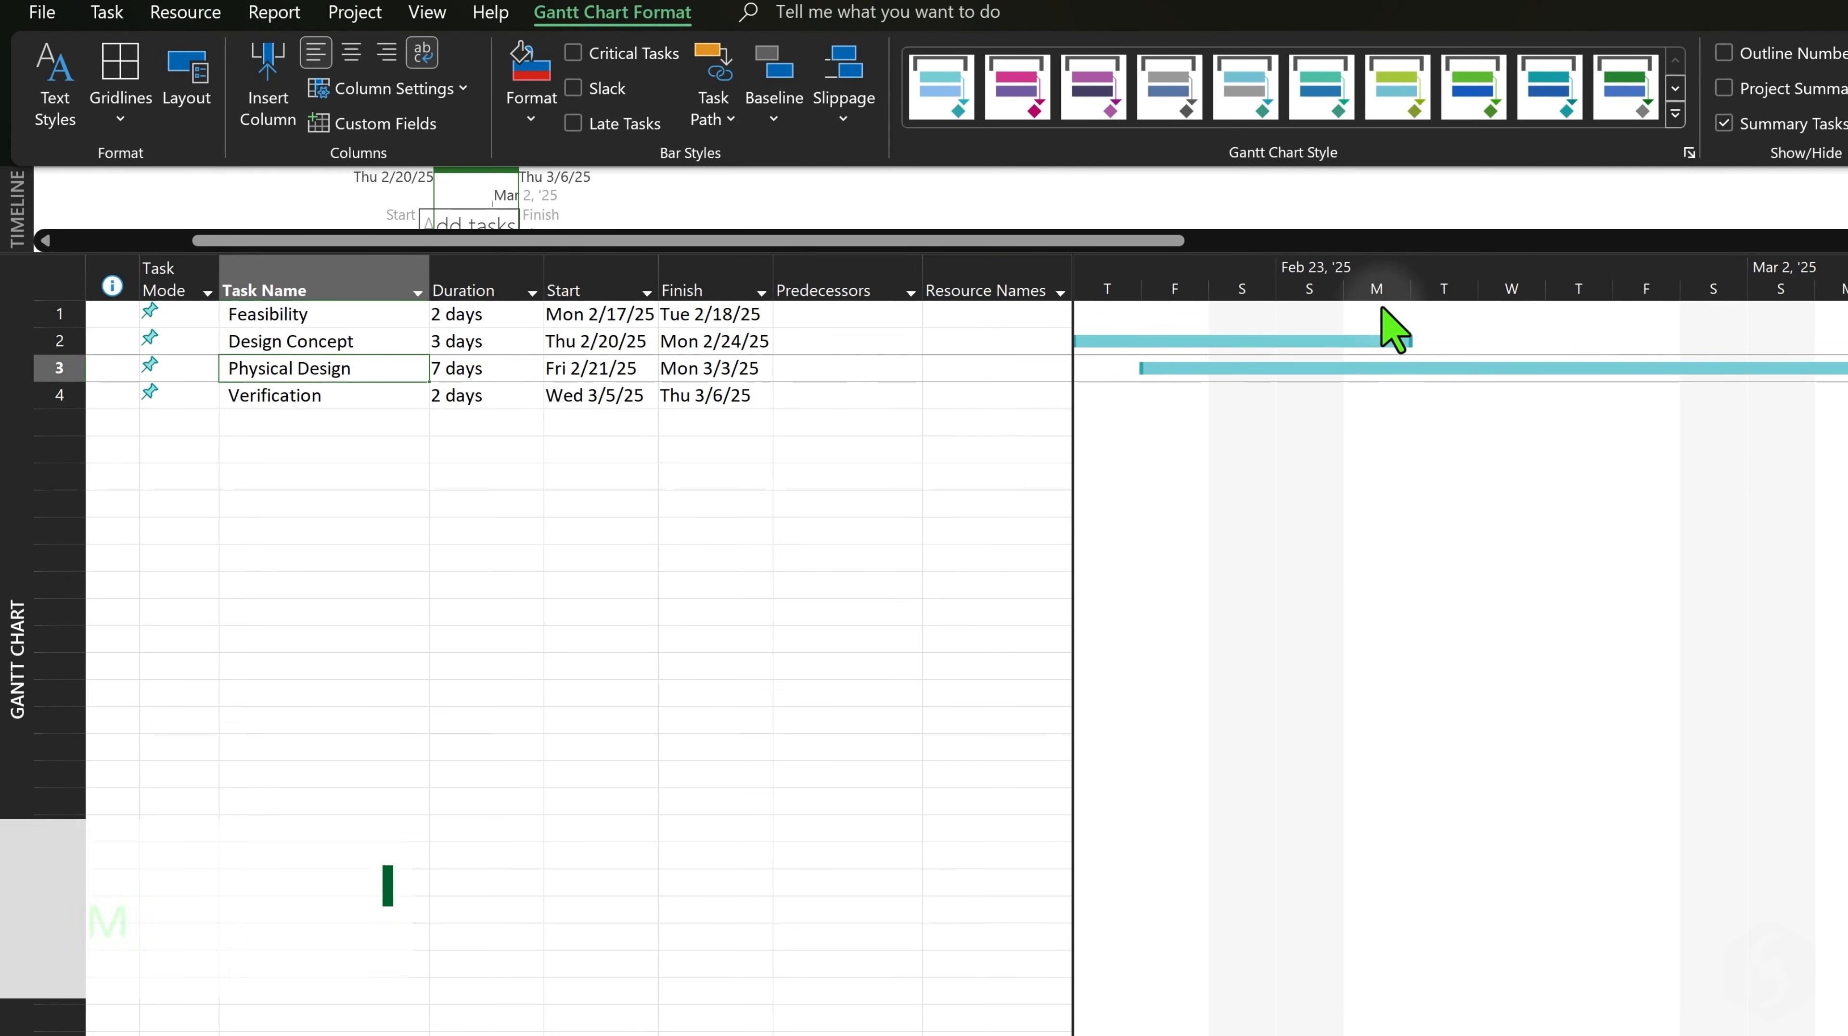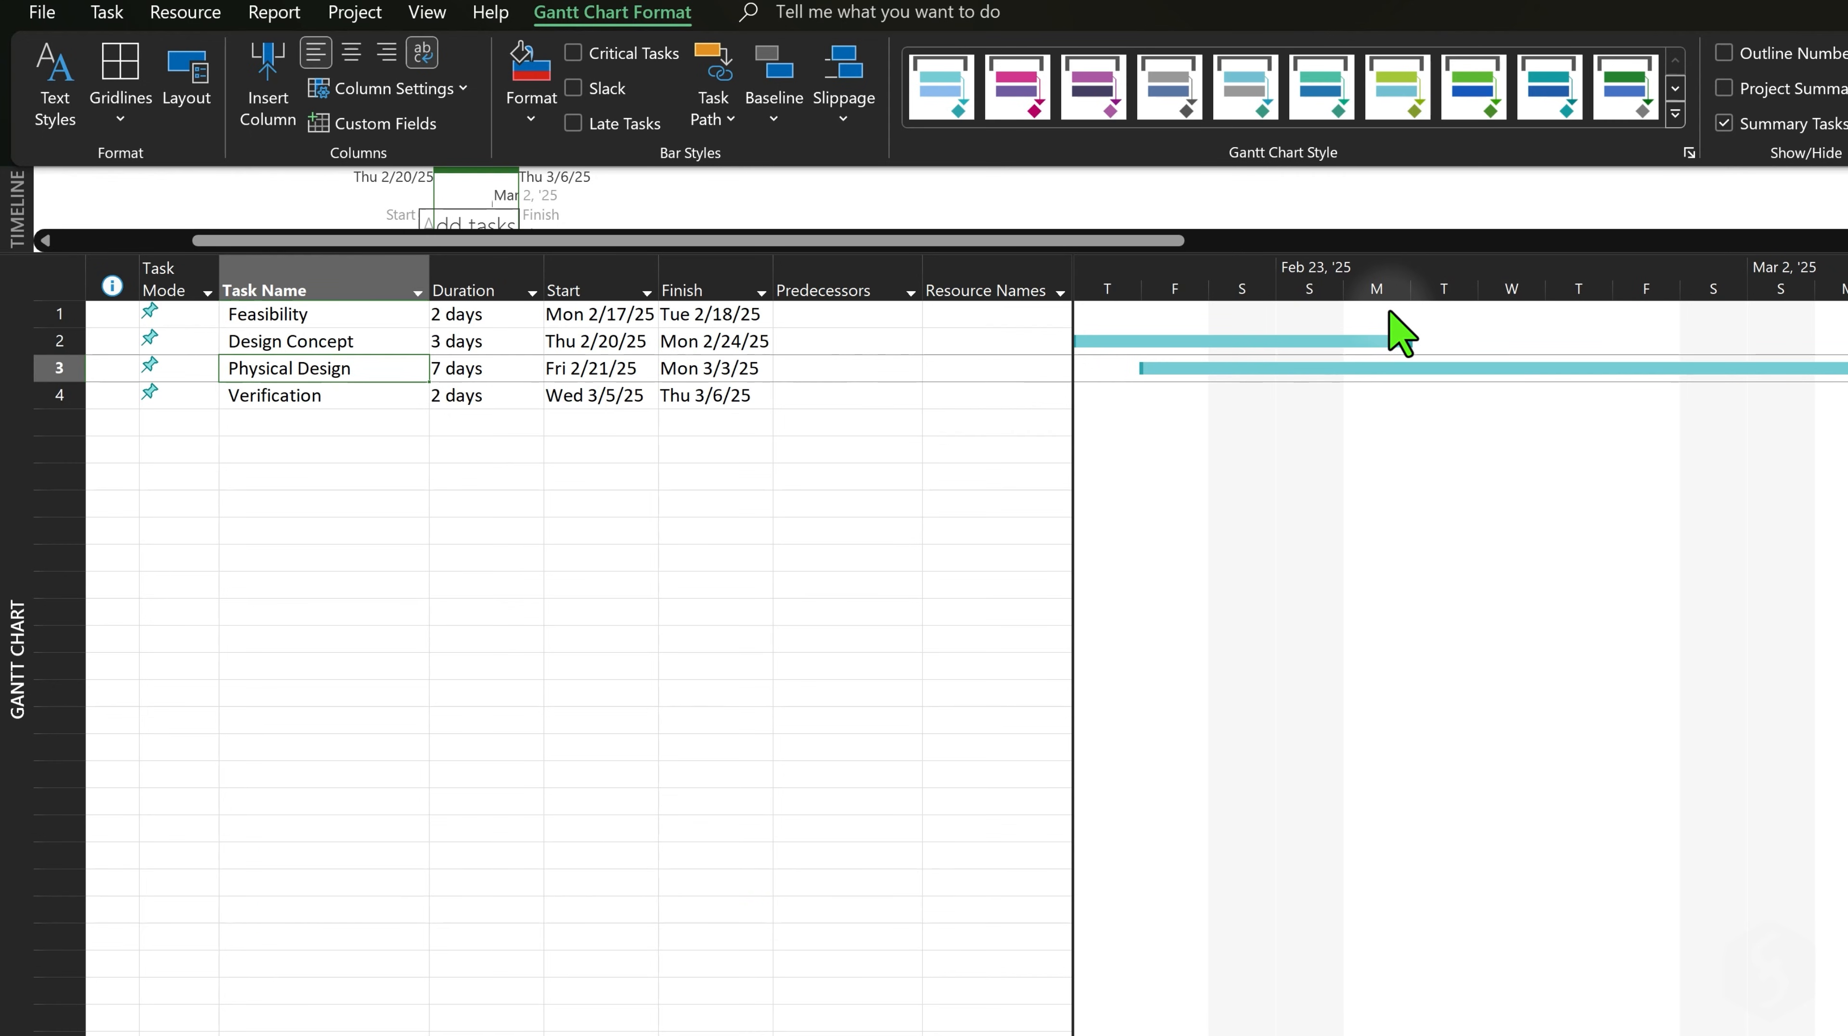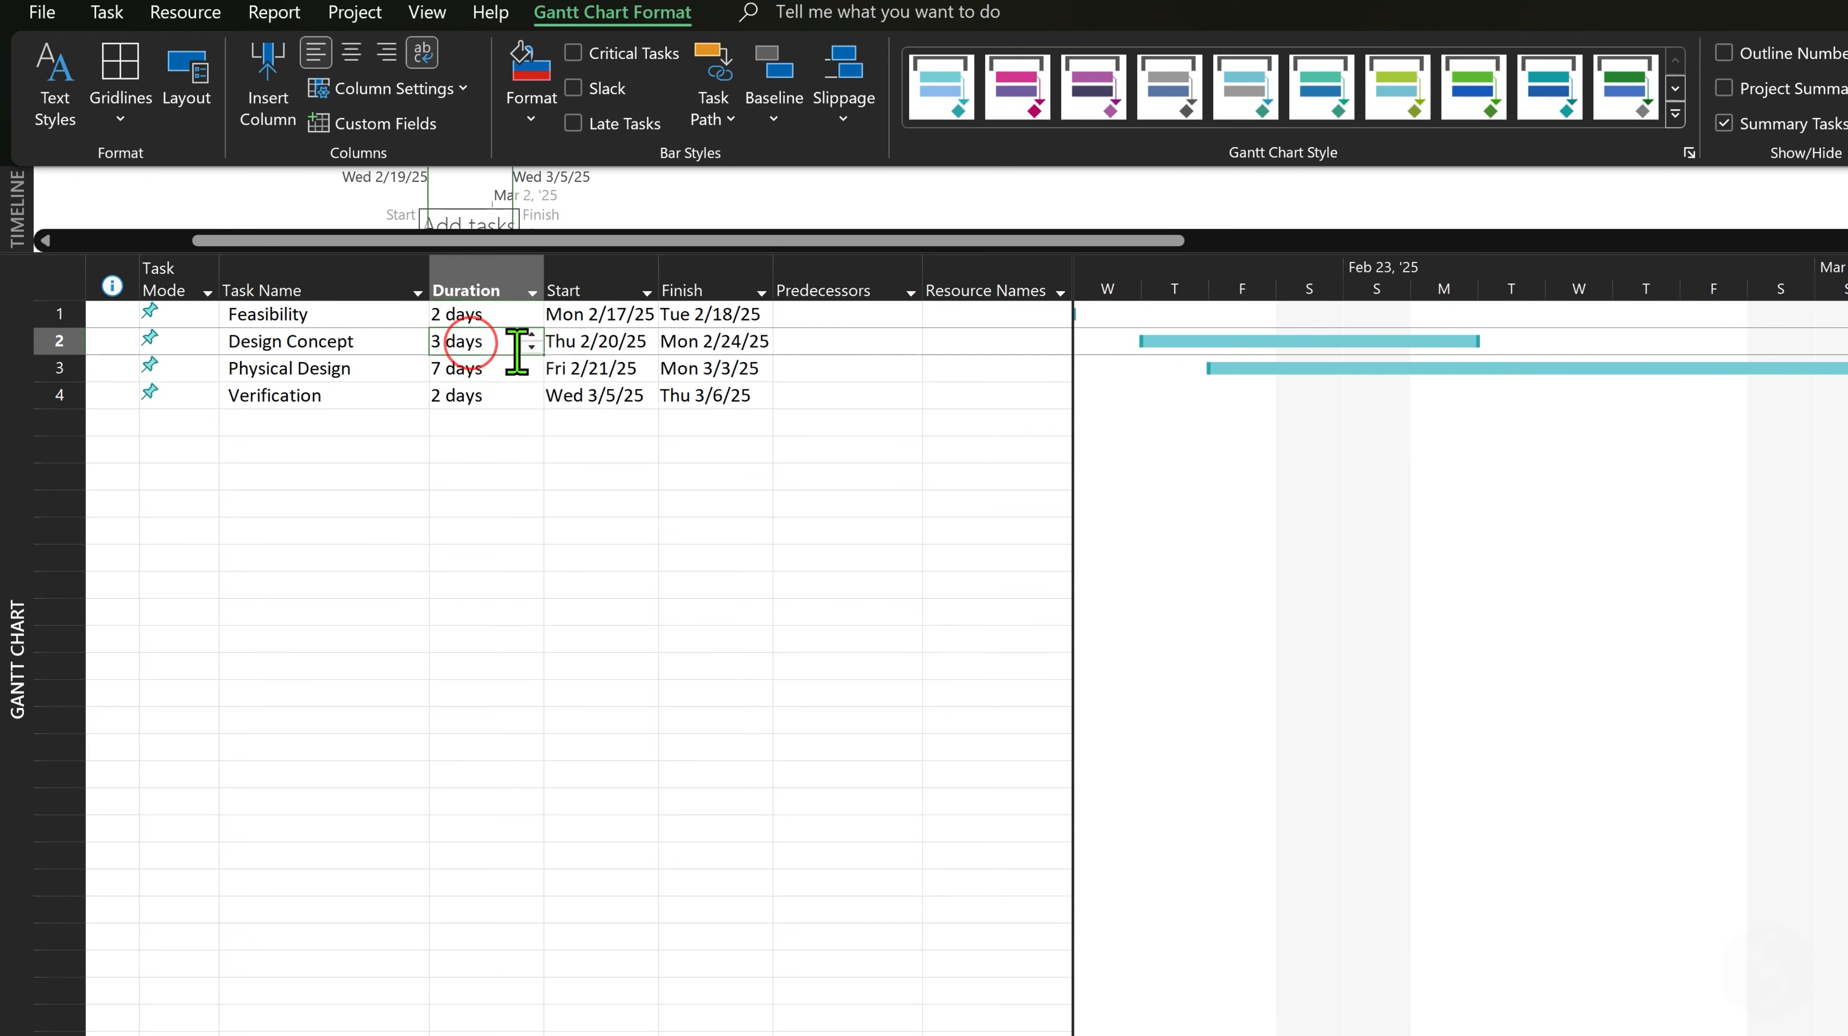By default Mondays through Fridays are considered working days in white color on the Gantt chart, while Saturdays and Sundays non-working days shown in gray color. If you move tasks over the weekends, Project automatically stretches them on the timeline to fit their duration in working days.